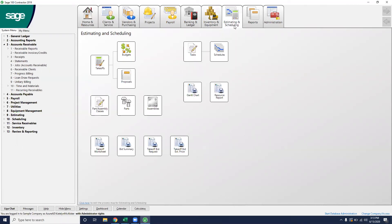Estimating and scheduling, there's a lot of different options for us on how we can track when and where we're going to start and stop our jobs. So we'll start by creating tasks. And then that will create Gantt charts for us to see when each task is going to be completed. Then we can put that against our budget that we did on our bid and against our proposal. So then we know our variance on if we're going to be over budget or under budget.